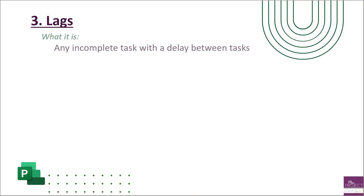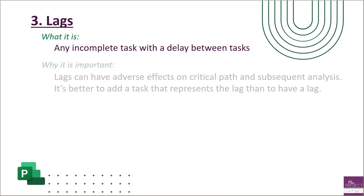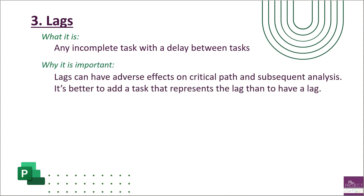A recap on lags: a lag is any incomplete task that has a delay between two tasks. This is important because lags can have an adverse effect on the critical path, just like leads do, and on any subsequent analysis. It's better to add a task that represents what that lag is than to have a lag.